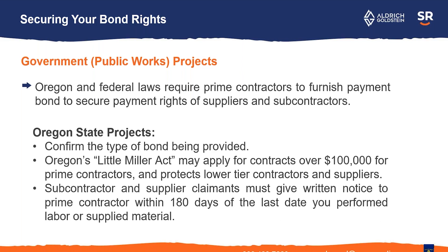Every state, as far as I know, has something called the Little Miller Act. These are individual acts that each state has that are the same idea as the federal Miller Act, but each state has its own requirements. In Oregon, if it's a contract over $100,000, you may be able to access the general contractor's bond on the project. You've got 180 days from the last day that you performed work or supplied material in order to file your claim. These are things you definitely want to see an attorney about, as there are offices that specialize in doing claims just like this.